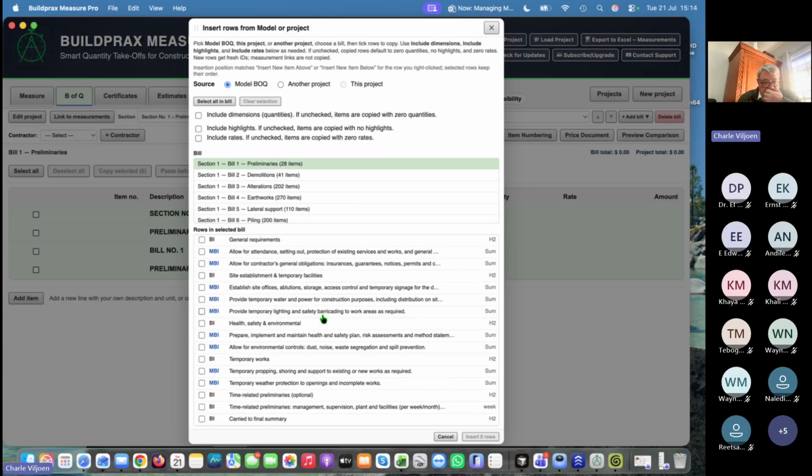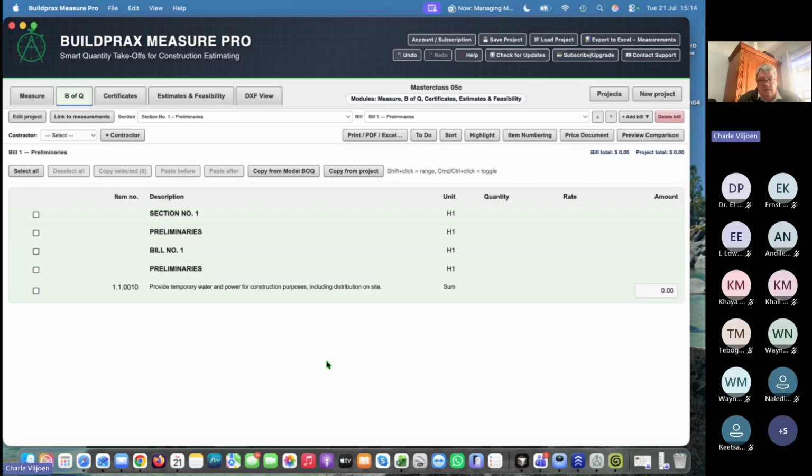And we have been through this. And let's say provide temporary water. Okay, just that one in there. And so we've got one item. And let's say you've got all your preliminaries. I'm going to just price it here so that we don't have to come back to it. And let's say it's 5,000 there. So now in section one, we've got our bill, and there we are.